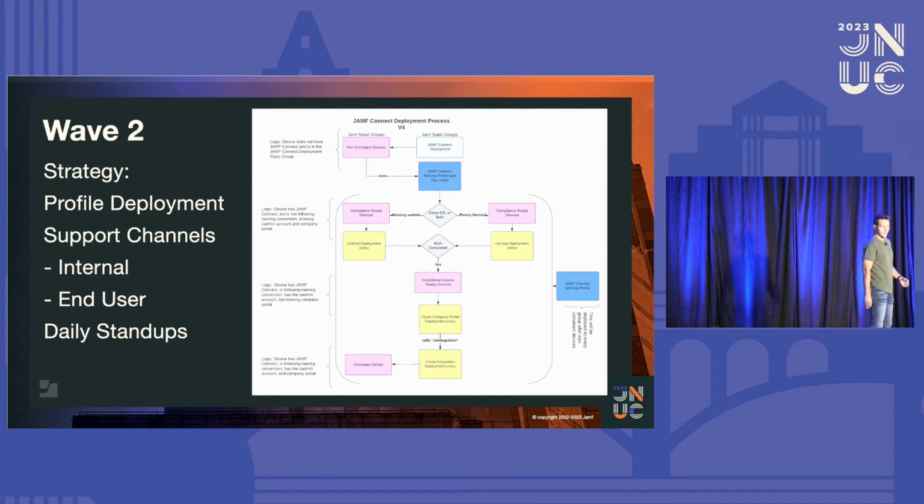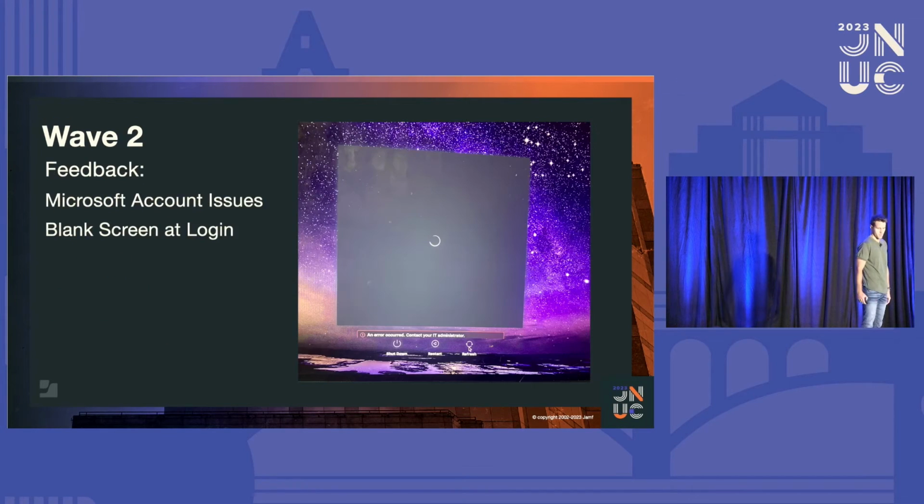We also added daily stand-ups. I know no one groaned it audibly, but internally we all kind of groaned at the word stand-ups because those stink, right? But this truly helped. That meant no one was locked out for more than 24 hours. Issues were escalated. The support team felt heard, which was very important because the support team needs to support us and also support the end users. It also helped prioritize issues correctly.